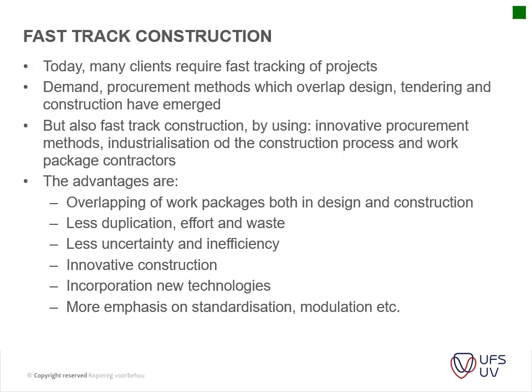So, fast-track construction. Today many clients require fast-track construction because whenever the money is approved, they want to spend it as quickly as possible, because otherwise they have to pay the bond costs, etc. Or if it's public enterprises, then that money should be spent within a certain financial year. That's why fast tracking is sometimes so important.